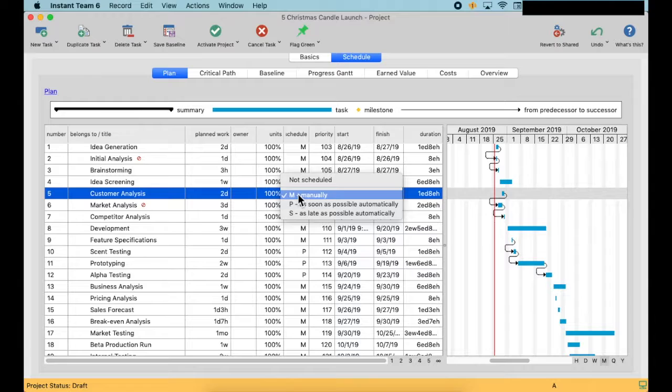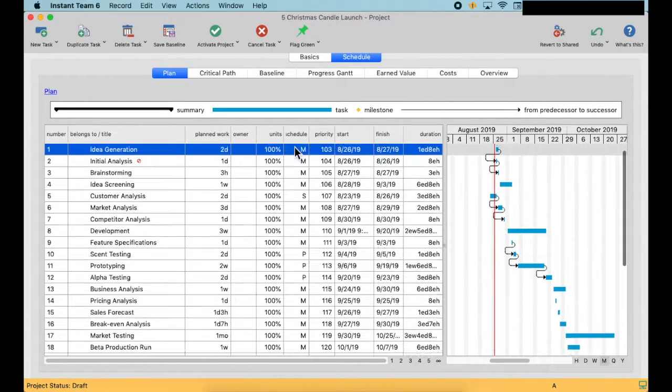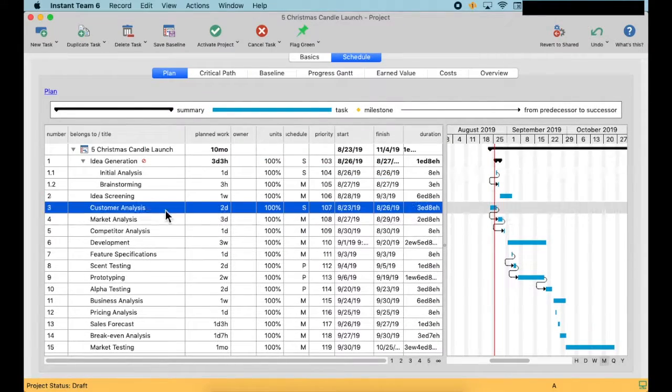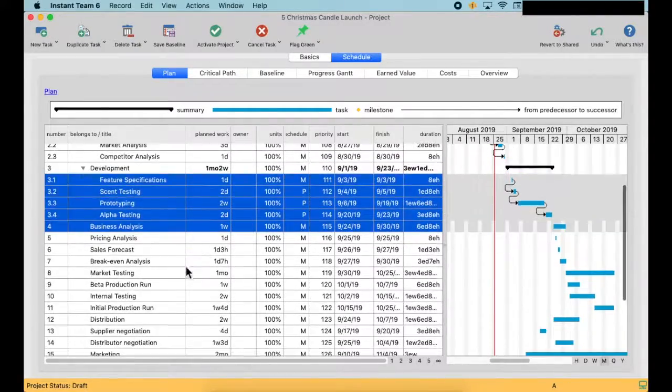By filling in the order fields S, tasks will move to the latest possible terms. This scheduling is useful if we have entered a date at the end of the project and we want to know when we can start working at the latest. Let's organize our project into a hierarchy.